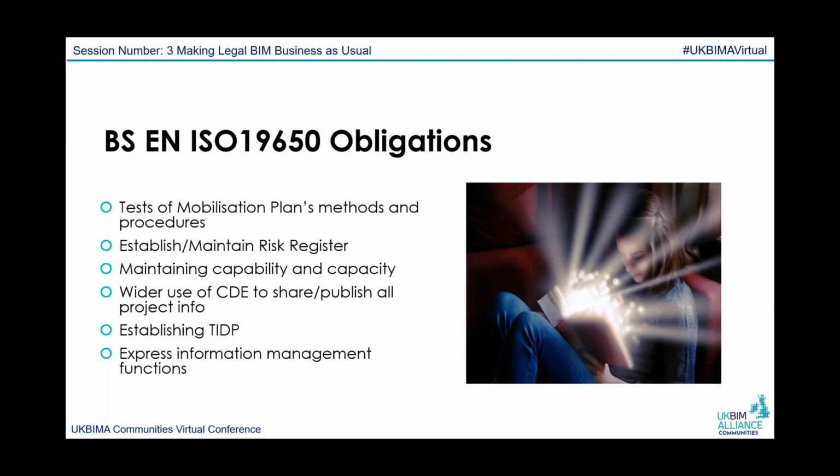We have inserted, where relevant, the specific ISO 19650 obligations, where they are meant to flow down specifically into contractual obligations. So things like establishing and maintaining a risk register, maintaining capability and capacity, who should be establishing the TIDP, the MIDP, what the various functions and tasks are and who should do them.